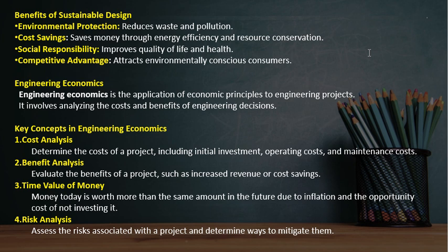If you want an excavator, go to the company and ask them what is the price of the excavator. If you want to rent it, you can go to another company and ask them what is the rent of the excavator. So this is called direct cost. Items for which I know the cost, I can know the cost directly from the market. If I want to hire labor, I can go to any person and ask what is the per month salary of labor, and they can tell me. So this is direct cost.